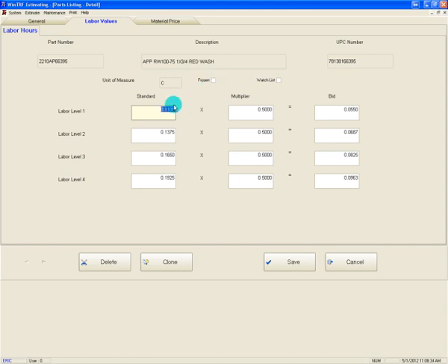The left side of the labor form has 4 standard labor units. Standard labor units are sometimes referred to as change order or book labor units. These values are obtained from labor manuals produced by the different trade associations or published and sold by publishing houses dedicated to different trades. When a value cannot be found in a manual, we will normally calculate it as being double the bid or productivity value.